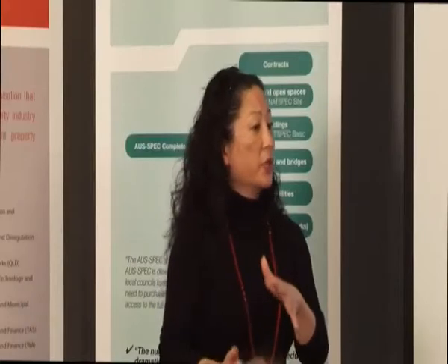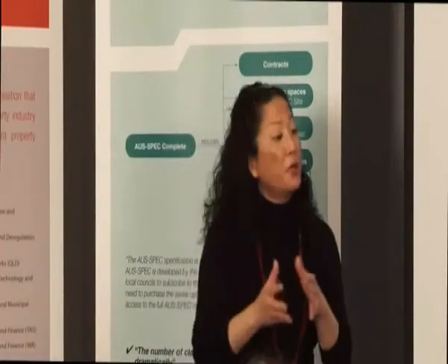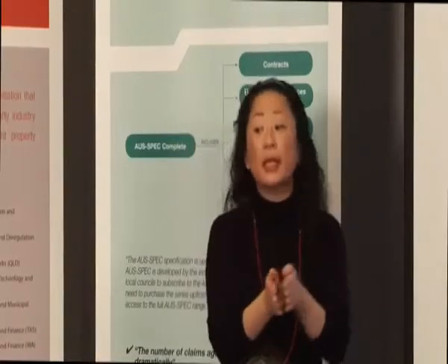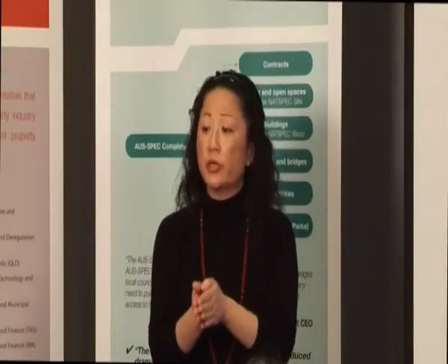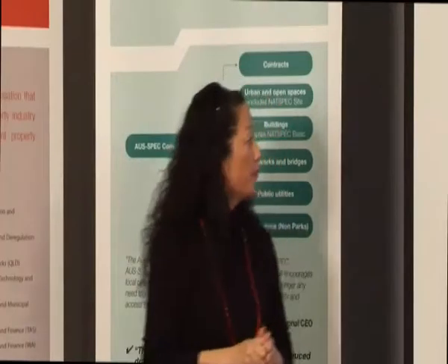Because of the way a specification is put together, there's lots of cross-referencing. People are so caught up in writing traditional specifications where it's a single document, you deliver that document, but when it gets on site, it gets split up into its individual pieces and handed out to the different trades. But if they're only getting their particular section, they're only getting half the story, because all those work sections cross-reference other work sections. So you need to be aware of how that working document is going to be split up and given to all the trades.